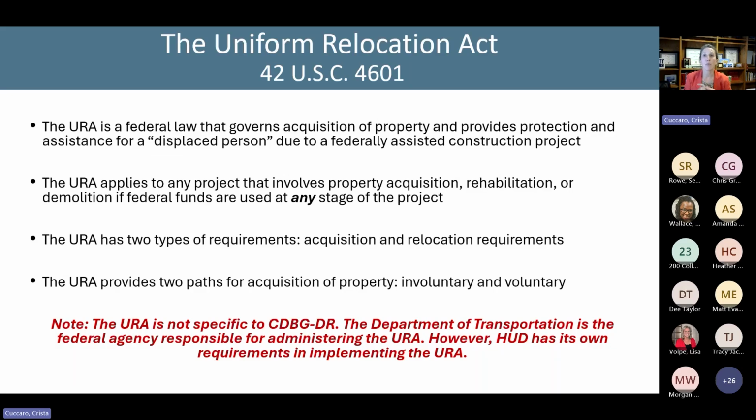An important point about the applicability of the URA is that the URA applies to any project that involves property acquisition, rehabilitation, or demolition if federal funds are to be used at any stage of the project. So it doesn't have to be the case that federal funds are being used for one of those three activities, or more than one of those three activities.